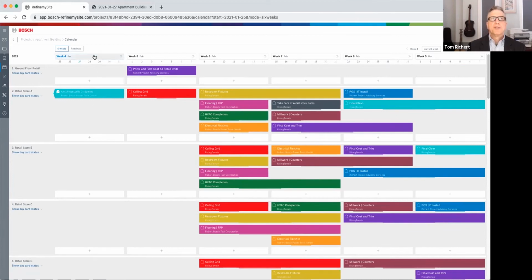I really want to just open up some of these weeks. The 6-week view is very important because it's part of your make ready process, and you'd go in the 6th week and you confirm that things are ready to work. And for example, this is this point of sale IT installation work.